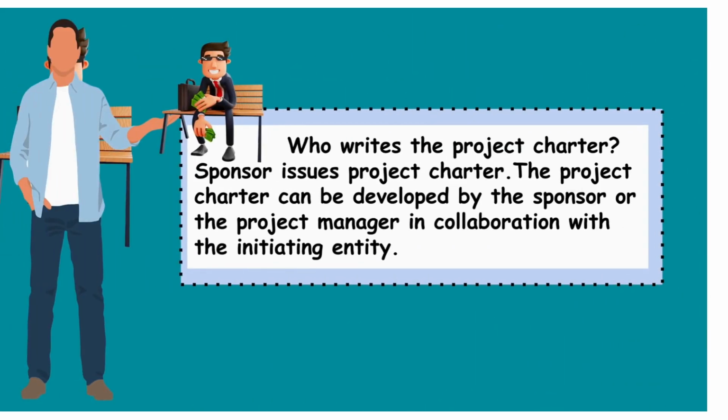So who writes the project charter? The project charter is generally written by the sponsor, but the sponsor can also delegate this task to the project manager. And sometimes the sponsor and project manager both write it in collaboration with the initiating entity, if the initiating entity is a third party or if it is an external project.